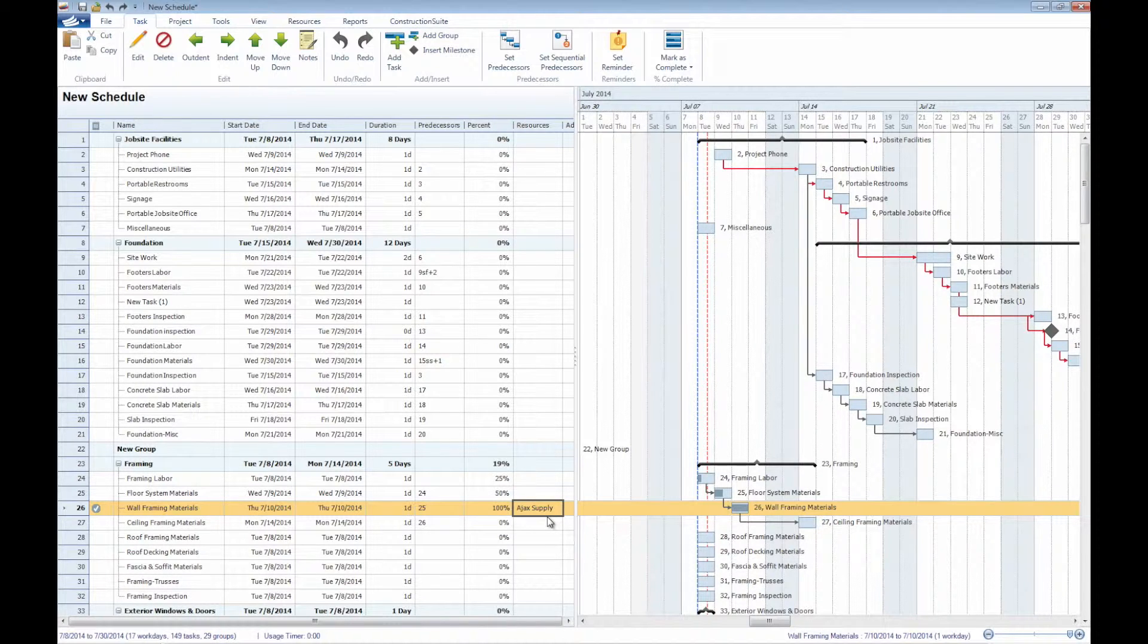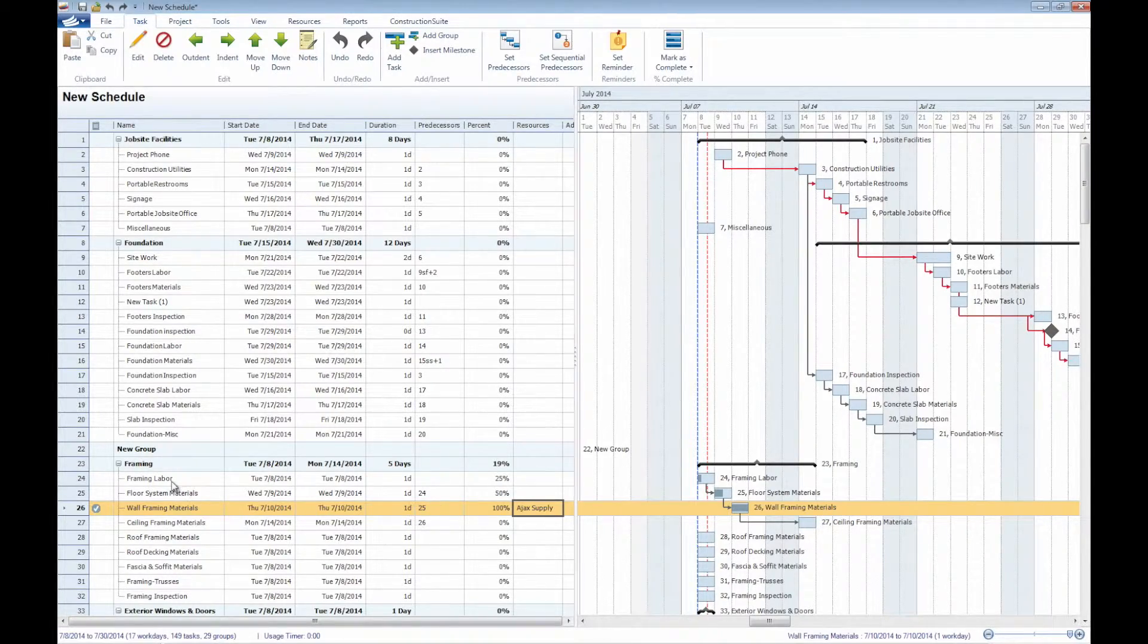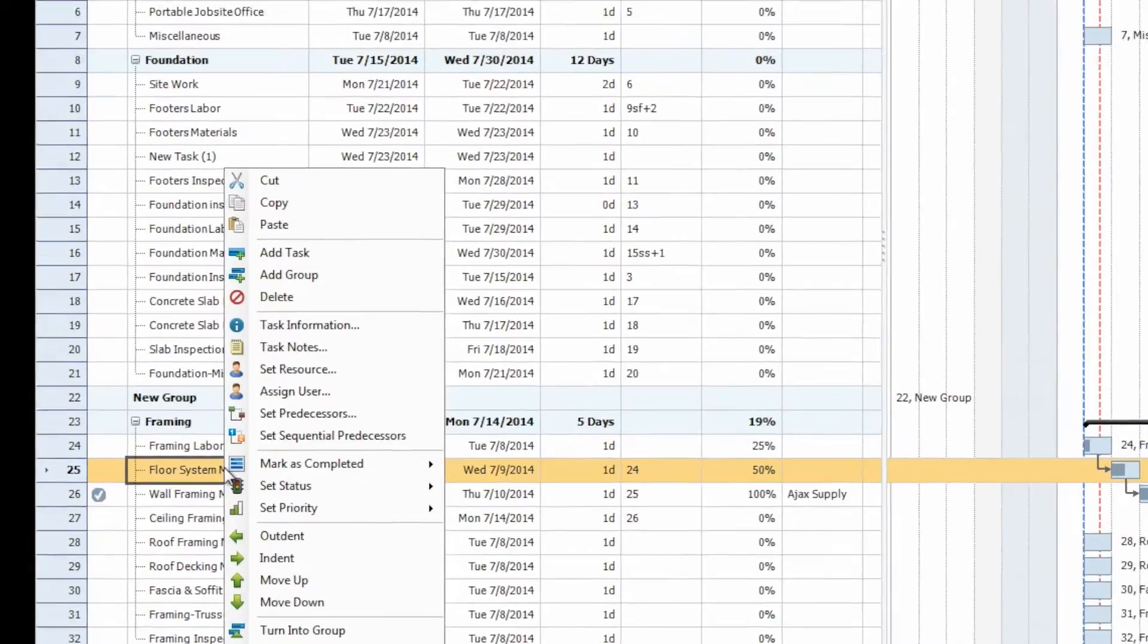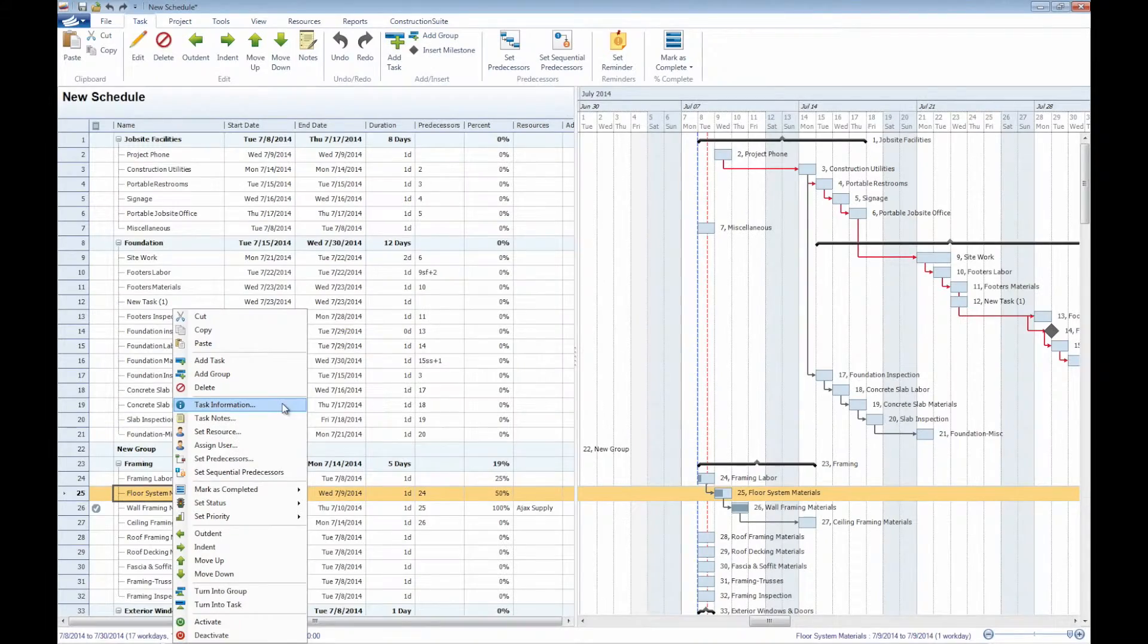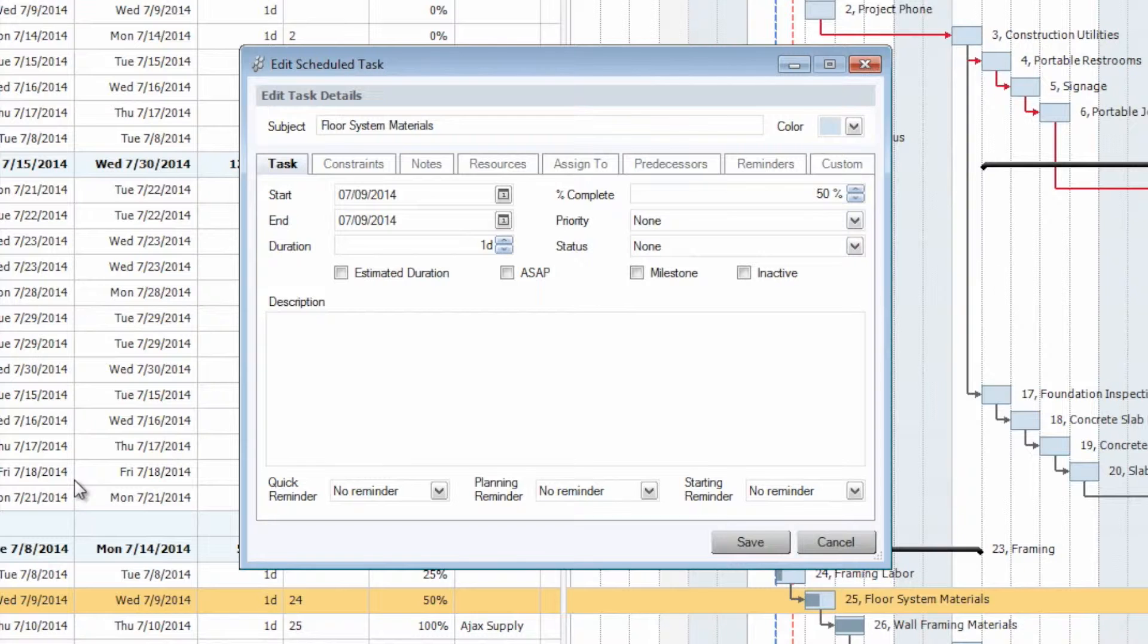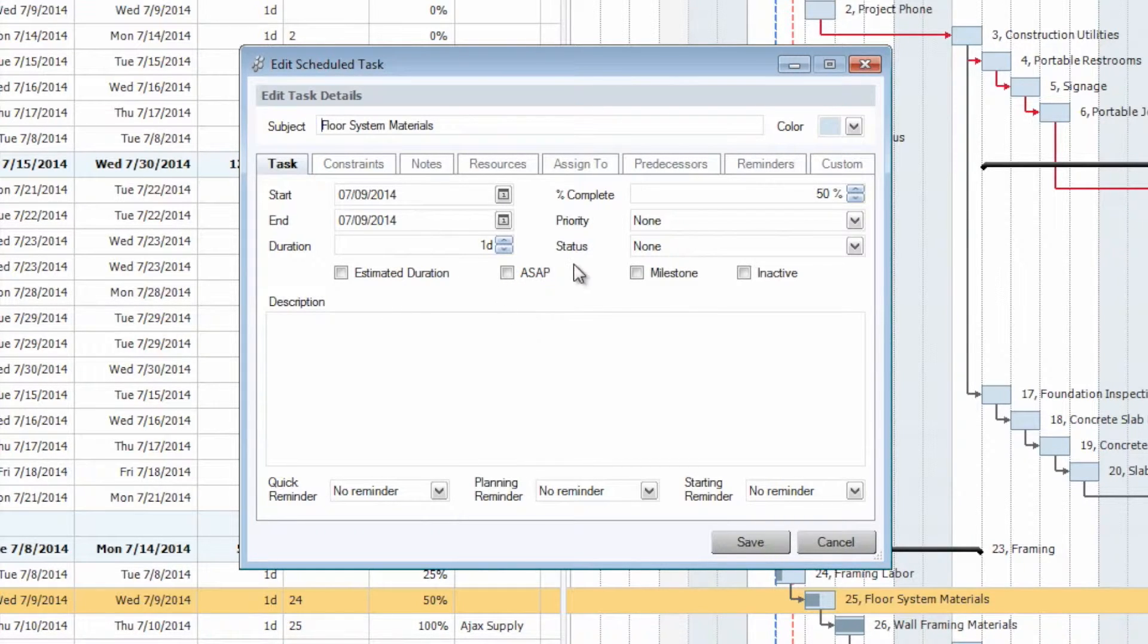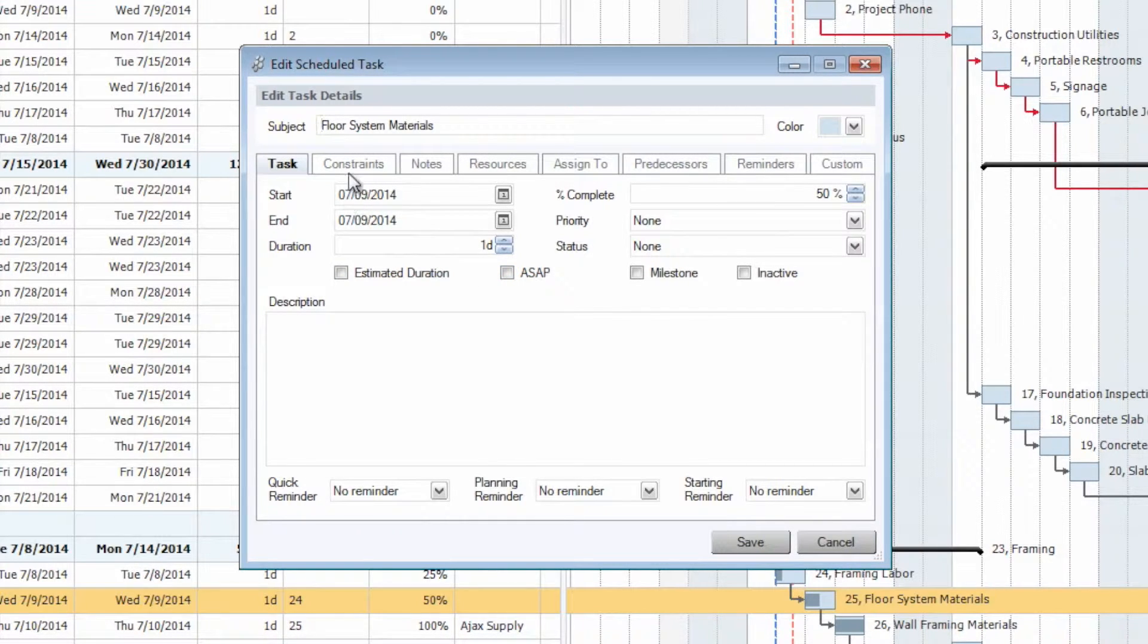Now, if you would like to maybe enter in all this information at one point, instead of going through each of the individual columns, by just right-clicking on any task, we can go ahead and select our task information. This is going to bring in the edit schedule task window, where we can change everything from the subject of the task, as well as the start dates, end dates, and the durations, as well as percentage complete, priority status, all here within the task tab of the edit schedule task window.